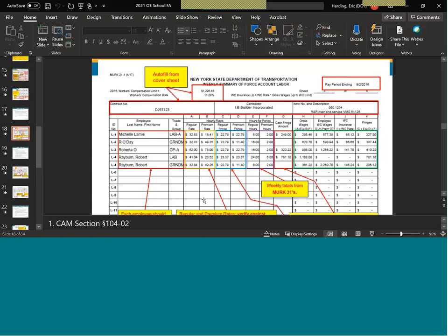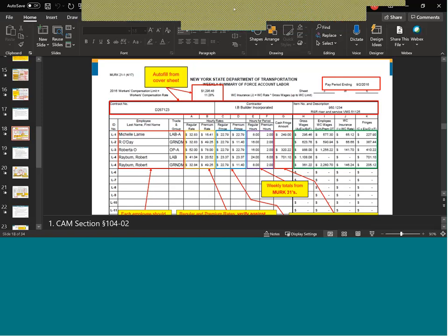Now, whether that's the entire fringe amount or if that's going to coincide with their fringes, the hours times the rate. Sometimes it's broken down, but say it worked out to $249 by going by regular fringe times fringe rate, meaning they're not paid directly. In that case, you're going to put 249 in cell G there, and you're also going to put in the fringe rate in cell C. So that way their fringes, whether they're regular or whether they're paid in cash, it'll get carried over to the labor subtotal on the MERC 20.